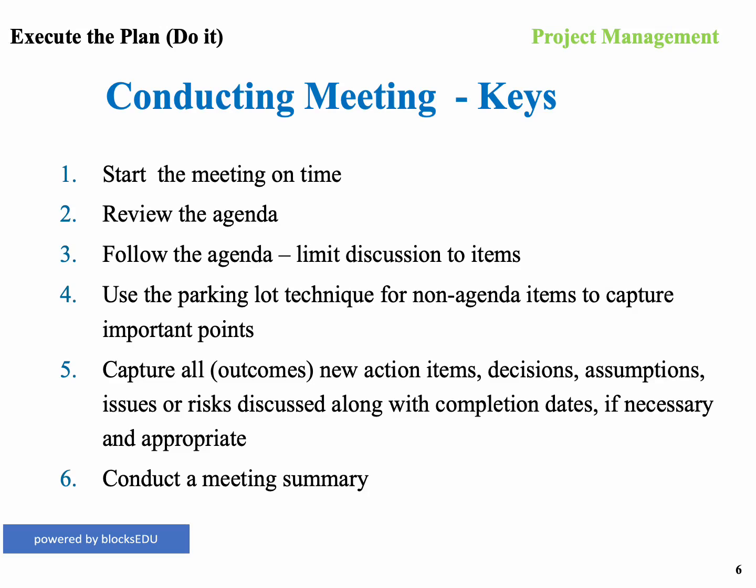Is there anything that comes up that's important? Park it and come back to it later if you have time. Capture all outcomes, new action items, decisions, assumptions, issues, risks, discussions along with dates, if necessary and appropriate. Conduct a meeting summary. Right?